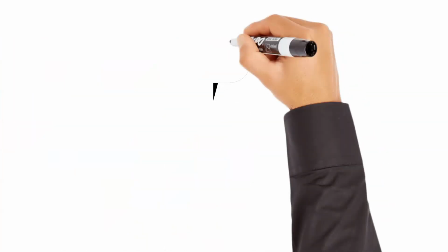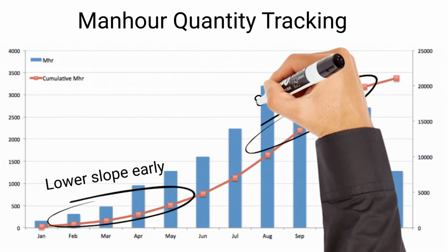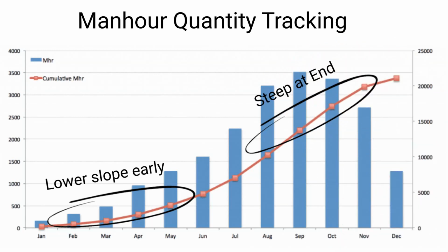Another common use of S-curves is for quantity tracking. This is most suitable for bulk material quantities, which can typically be found in the construction and manufacturing industries. The planned quantity versus the scheduled time is plotted, and then it is tracked along with actual quantity consumptions. This way, the progress of work by quantities is monitored and any deviation from the baseline plan is quickly revealed.